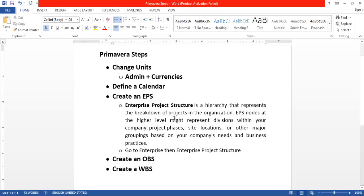If you are not familiar with the term enterprise project structure, let me give you a brief definition. Enterprise project structure is a hierarchy that represents the breakdown of projects in the organization. For example, you have a bigger project and you divide it into smaller sub-projects, and all sub-projects are assigned to individuals responsible for performing them. This breaking down of the project into sub-projects according to tasks and activities is known as an enterprise project structure.